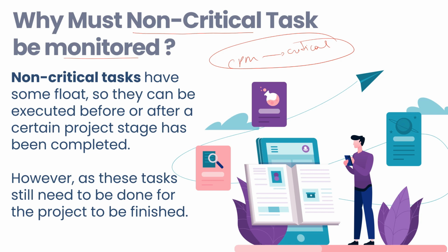So it's very important. Even though the non-critical tasks are not urgent at that particular point of time, they may become critical if those activities are not completed, or there's no focus on them, or they are delayed. You might think, I have a float, so I can work on those activities later, and later on you realize you have no more time to further delay them, and you have to start those activities.